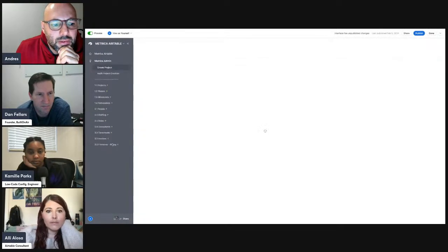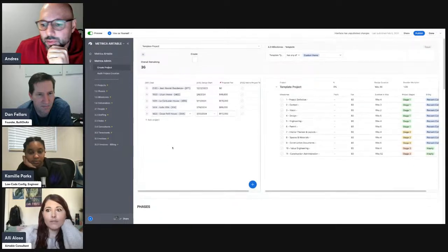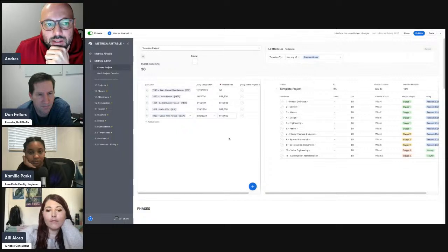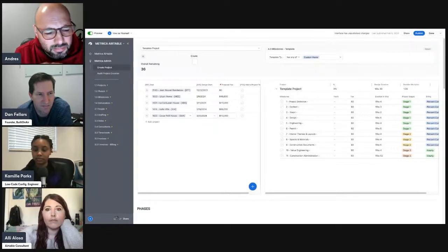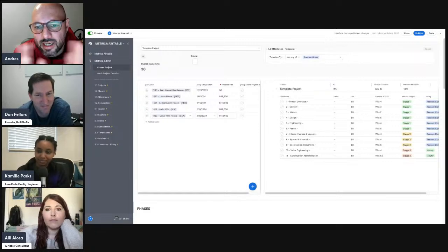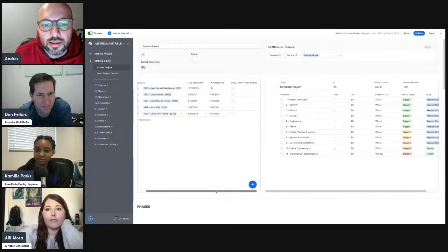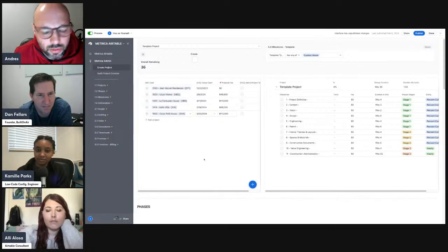But the other part that I want to show you is the way to create the projects, because this is what's taken most of the time. So inside the base, I think I was indexing this recently because it was just getting out of control, and I think I have more than 500 fields across 25 tables or something. The idea is that I have some project templates that have pre-assigned values. So when I create a project, I can assign one of these templates, and it's just going to essentially generate the project work plan live. So is it okay if I do a demo here?